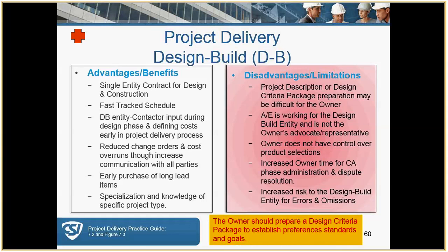A design build contract may be two contracts, one for design and a second for construction. So this is important to note. Even though you have one contract with the owner, you may have a 2-part contract, one for design and one for the GMP.